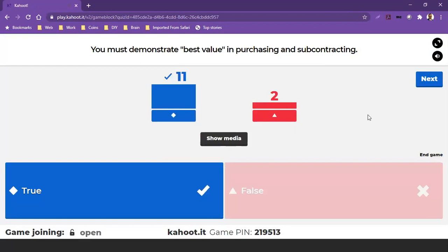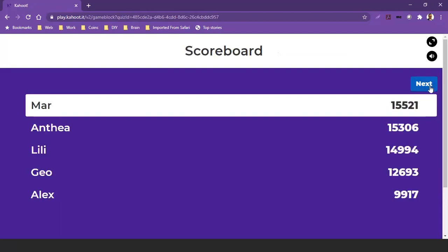Just to clarify this point, if you are issuing a tender and you go by the national rules, which currently are cheapest price, that is still considered best value because that's the practice you carry out in your entity. If there are any other rules that apply to tenders, they're still considered the best value approach because that is your normal and national approach. So let's continue with the next question.